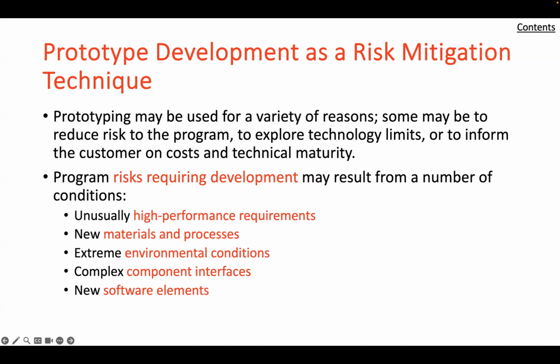In looking for potential problems, it is essential to examine the entire system lifecycle: engineering, prototypes, storage, operational use, and operational maintenance. Special attention must be devoted to manufacturing processes, that is the ILITs, which are reliability, availability, and maintainability, logistics support, and the operational environment.